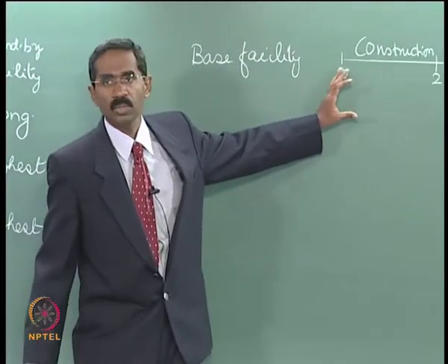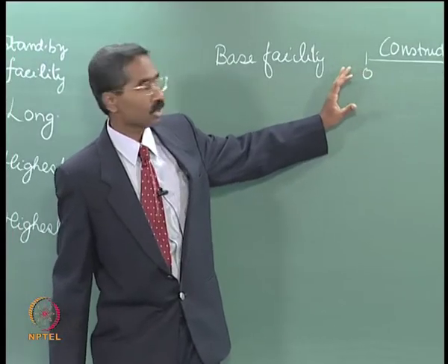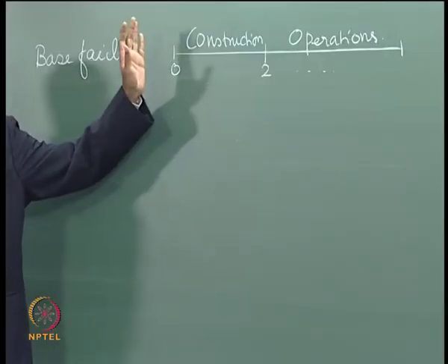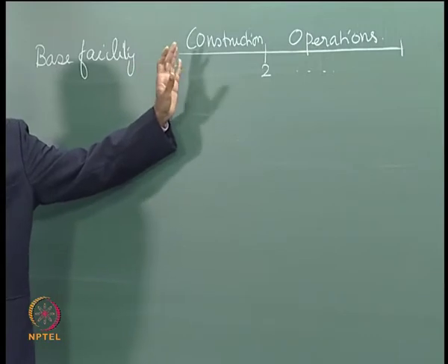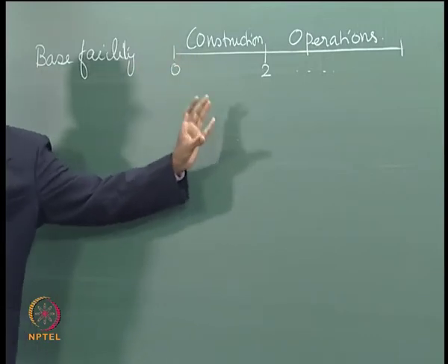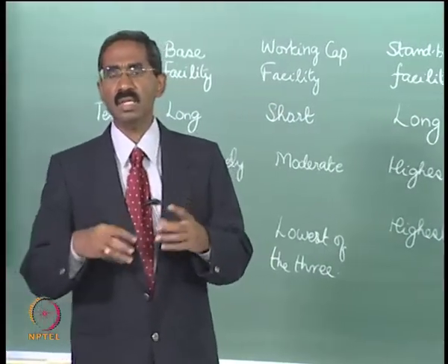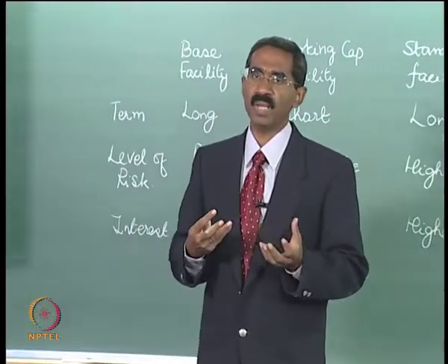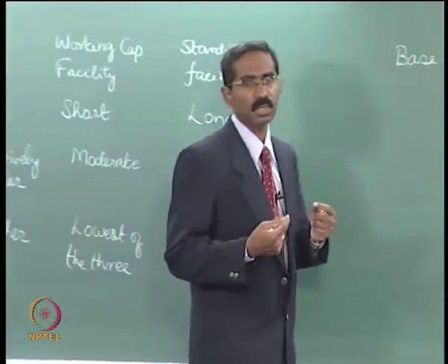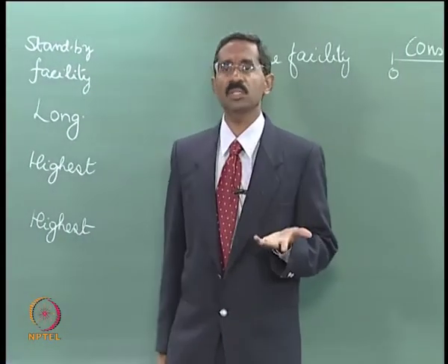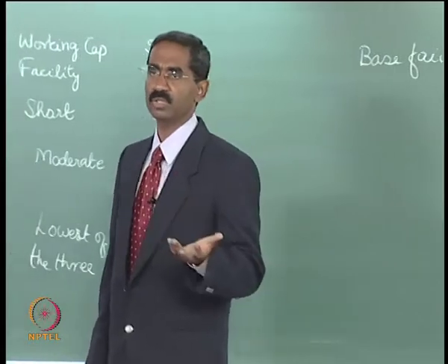Now part of the loan could be withdrawn at time 0, at 0.5 years, at the end of the first year and so on. So the interest technically would have to be paid from the time the loan has been withdrawn. You actually start paying interest on the loan from the time you take the loan.